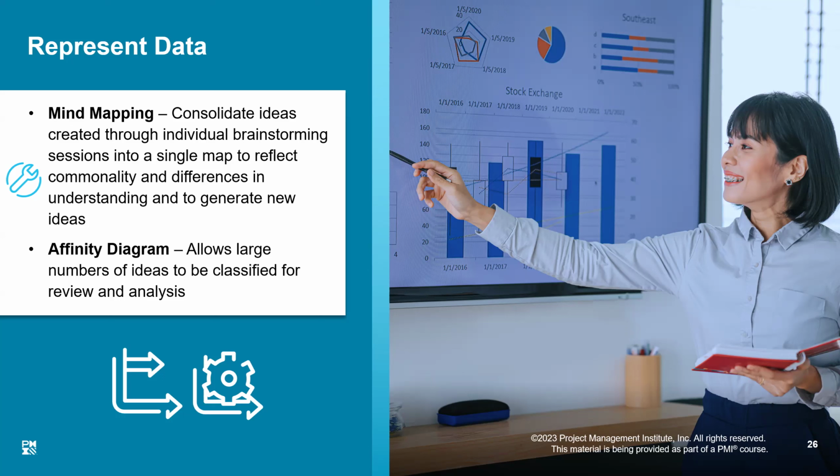Okay, that is a good idea. Spider web is a good simile. I probably never considered that. But yes, of course, it starts from the center and grows outwards. So, for example, you say the center is the project. Then I say, okay, this project is divided into 5 parts, 5 phases. So maybe we spread out and put 5 circles around the center. And I say, okay, these are my phases. And then each phase is further subdivided into things and ultimately to activities.